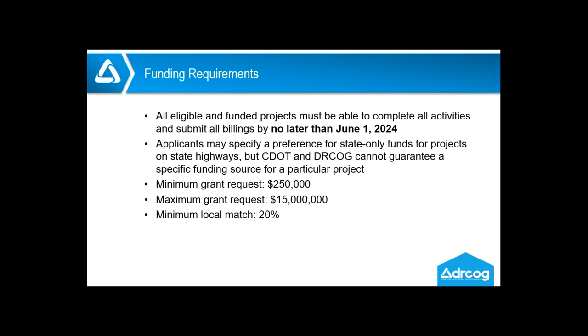We have established in partnership with CDOT a minimum grant request of $250,000 and a maximum grant request of $15 million and a minimum local match requirement of 20%. We did have a question from Eileen Yazzie about the match requirement. It is a 20% minimum local match for all funds. That was what we have negotiated, and CDOT and DRCOG are recommending it as part of this eligibility.